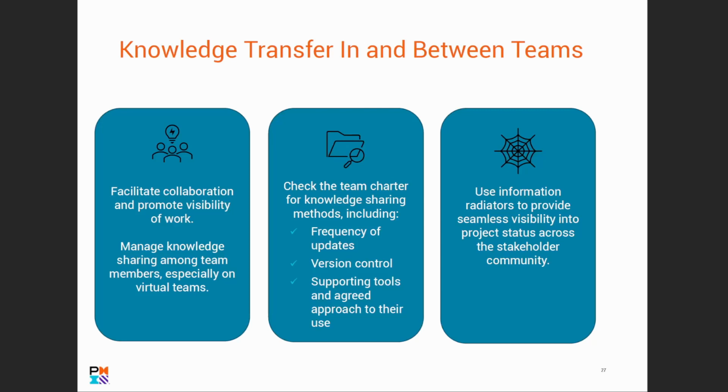You need to facilitate collaboration and promote visibility of work, manage knowledge sharing among team members, especially on virtual teams. Also check the team charter for knowledge sharing methods, including frequency of updates, version control, supporting tools, and agreed approach to their use. And finally, use information radiators to provide seamless visibility into project status across the stakeholder community.